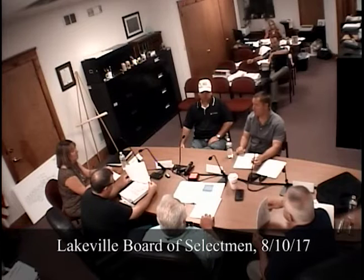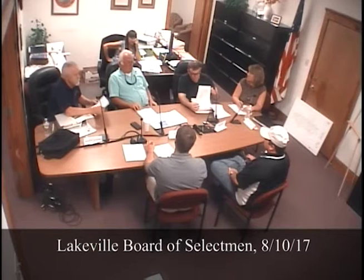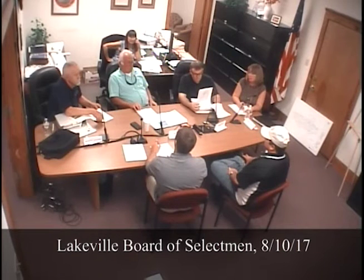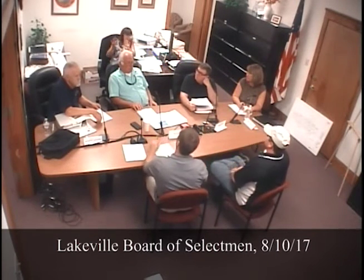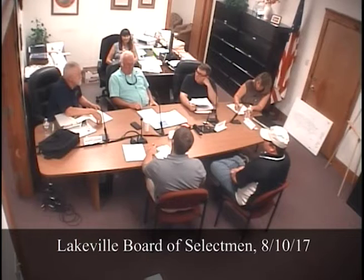Right. Town meeting votes, planning board can sign. I think the Board of Selectmen have to sign the Mylar too for road acceptances. But you're saying that night they could sign, really? Is this something that can be done ahead of that vote, like the certification of titles, can all the legal work be done? It can't be recorded, but you can start the process and have it all pulled together, I guess. Okay. Good to know. As long as no one sells a house between now and then. We won't allow it.